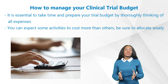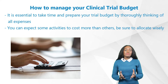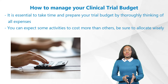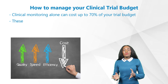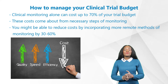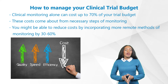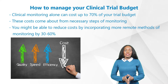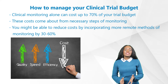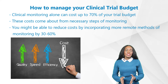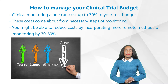It is therefore essential to take time and prepare your trial budget by thoroughly thinking through all expected expenses. Some activities will cost more than others, so be sure to allocate wisely. For instance, clinical monitoring alone can cost up to 70 percent of your trial budget depending on the complexity of the study. If you have several sites globally, costs will be accrued from just traveling to the site, usually done by the CRAs or clinical monitors.